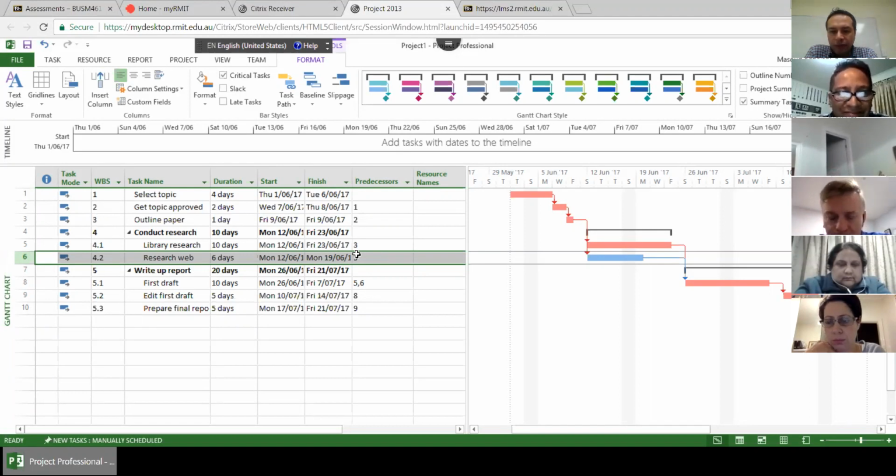So when we had our schedule, most of the activities had enough slack and were not on the critical path, because that long lead item was covering most of the critical path. So it depends on the project.